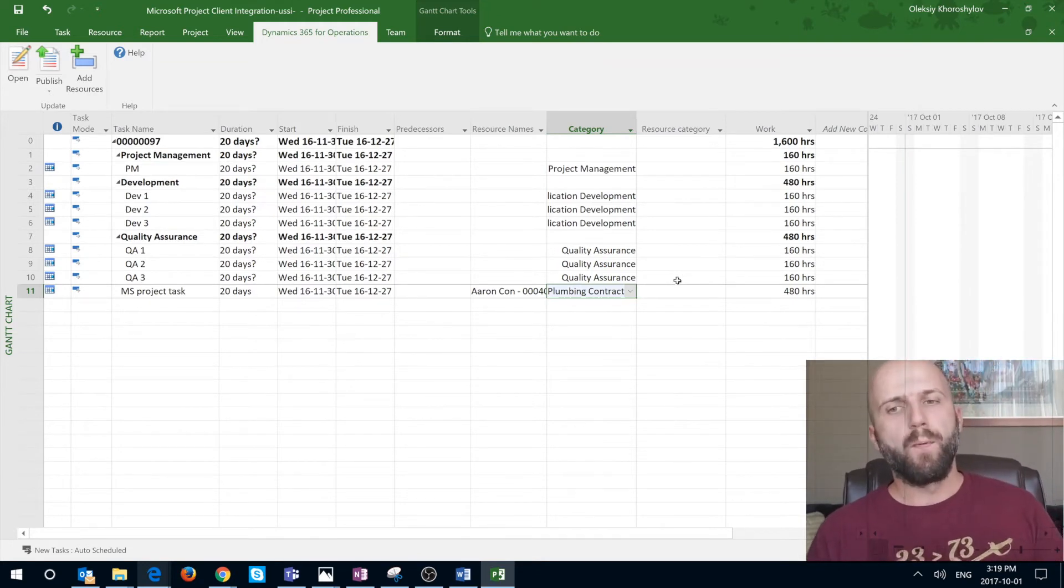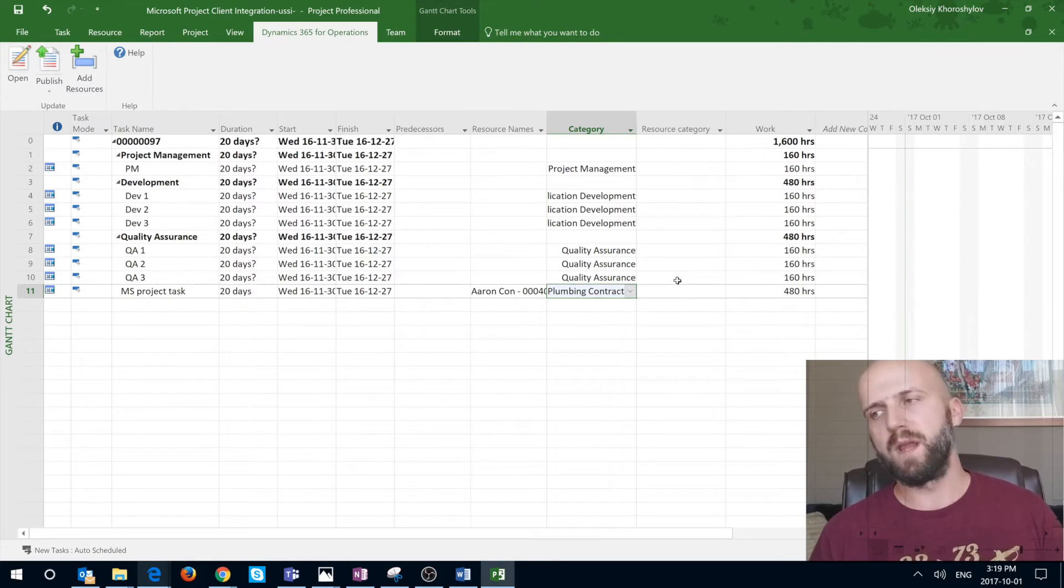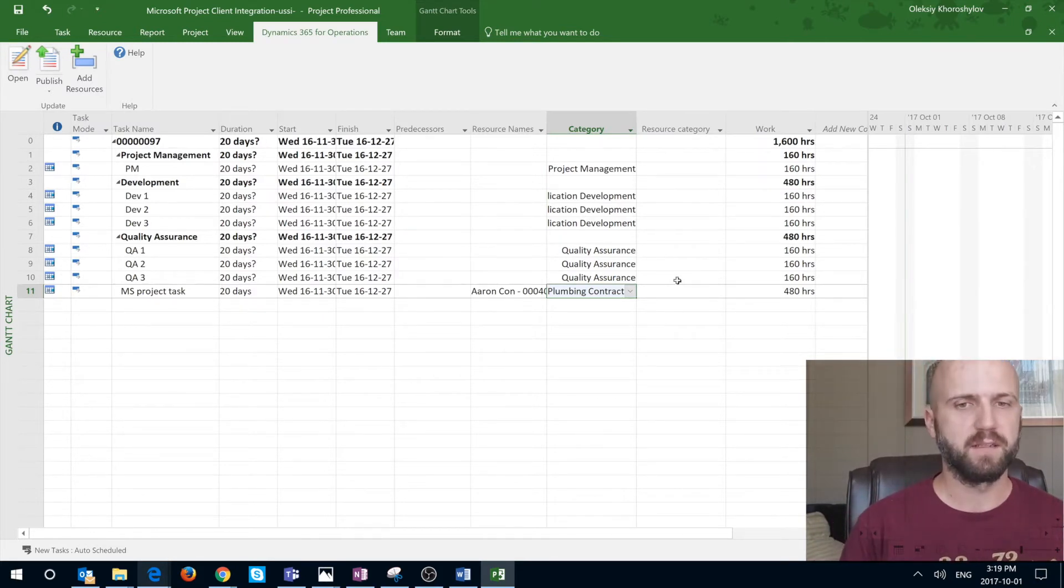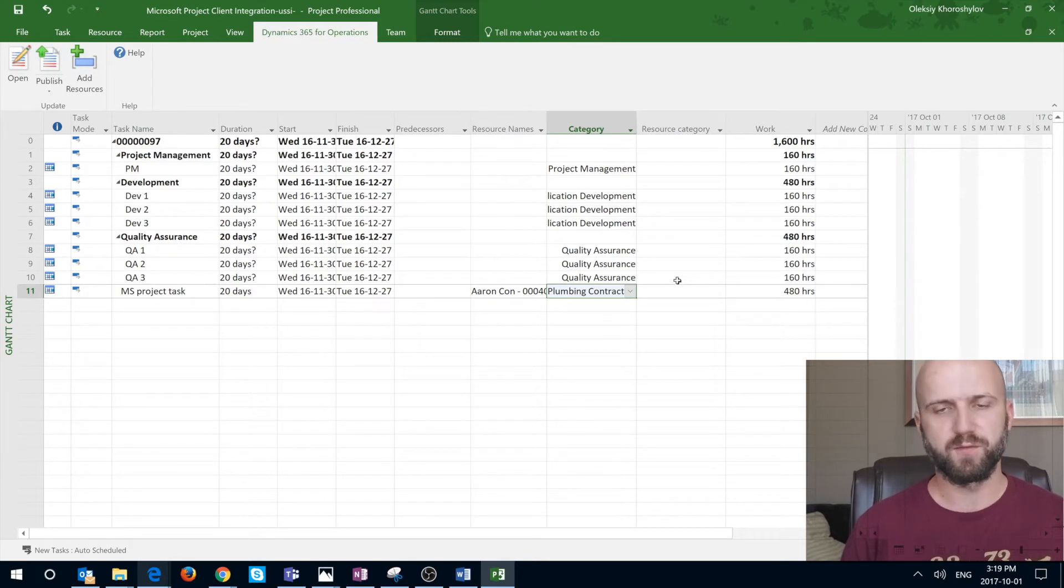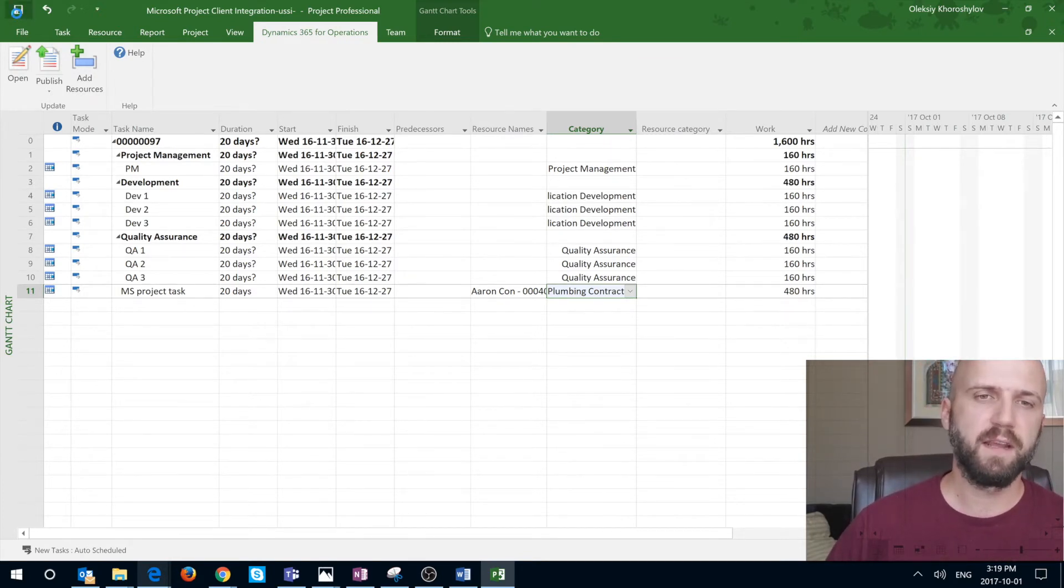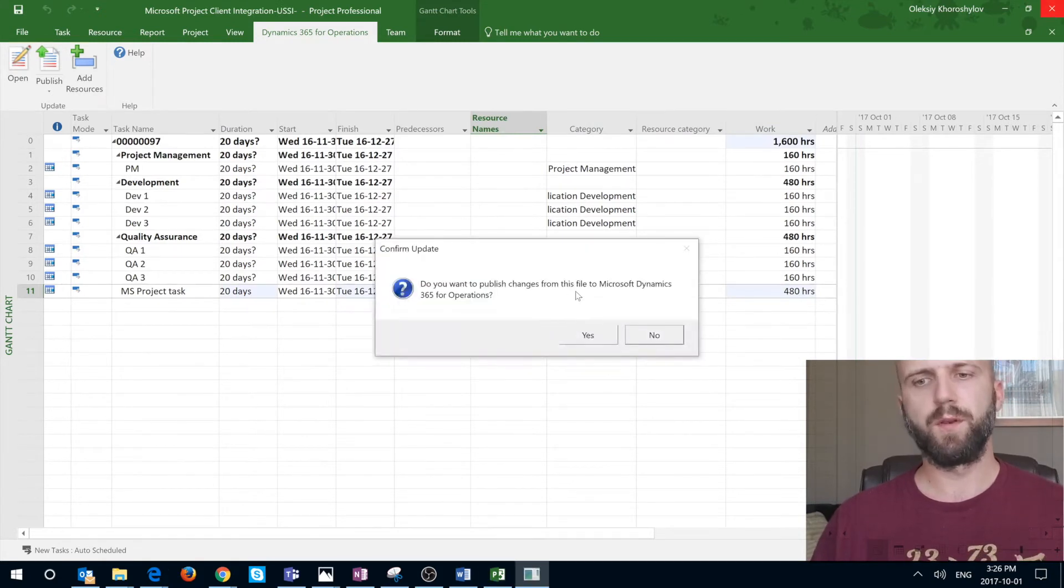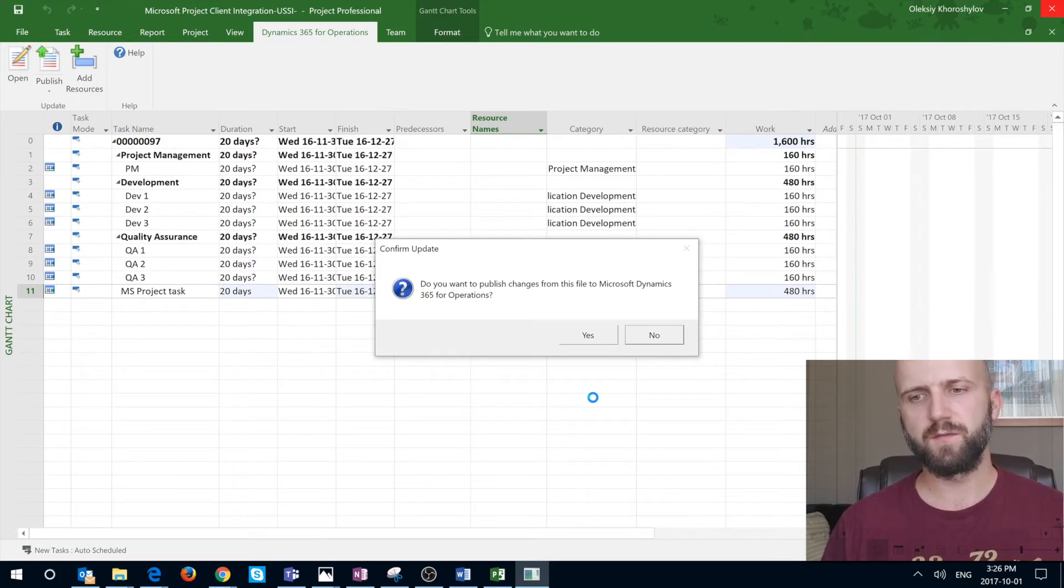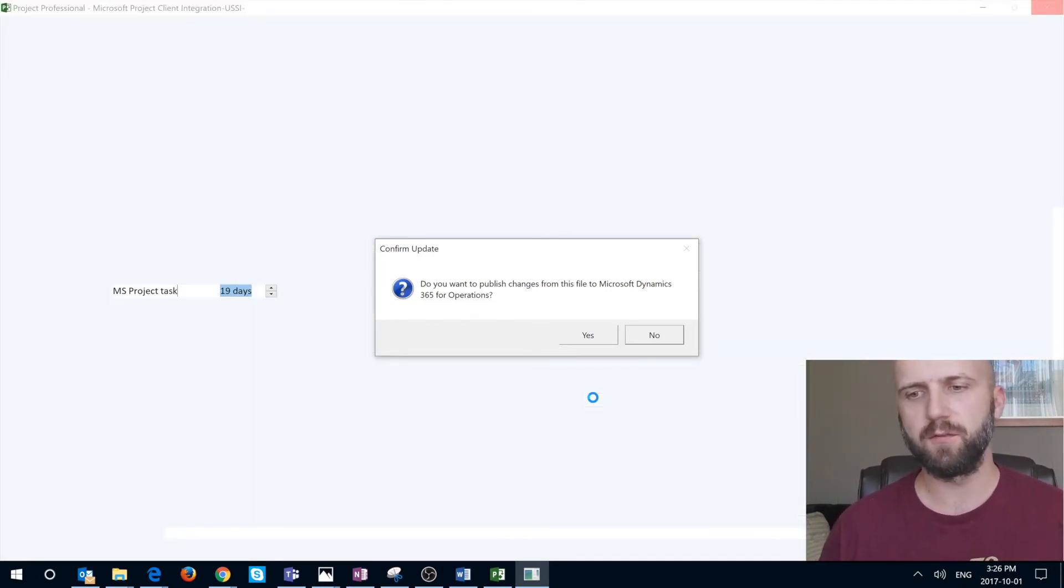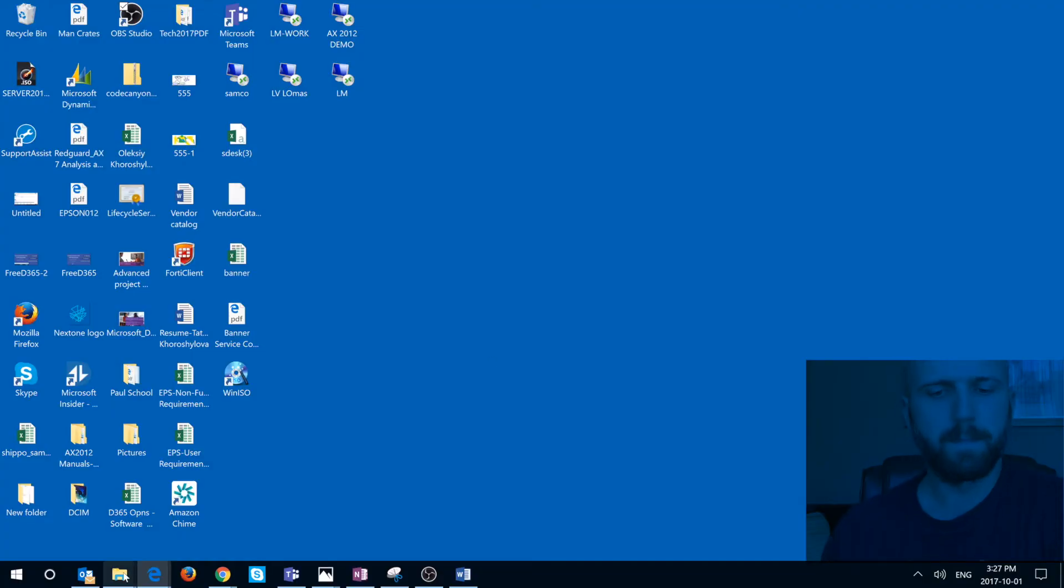As with opening the WBS structure, there are two ways you can publish. One way works for me, another one does not. Let me show you the one that actually works first. What I'm going to do here is I'm going to save the file and we can just simply close it. When you're closing it, you're going to get this prompt saying, do you want to publish changes from this file to Microsoft Dynamics 365 operation? And I'm going to say yes.